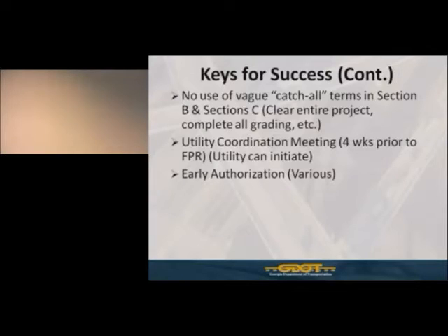Early authorizations. I touched base on that a little bit, but we can do early authorizations in any number of ways. We can do early authorizations for material procurement, for easement acquisition, for construction engineering, even all the way up to actual physical relocation work. Depending on the particular item, there's different hoops that the department may have to jump through to make it happen, the district and the state utility offices.